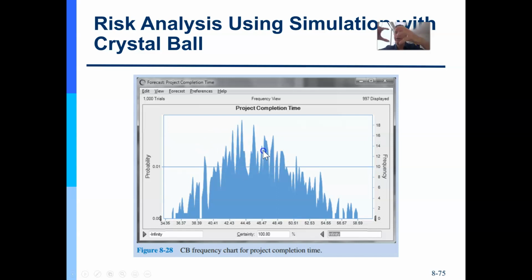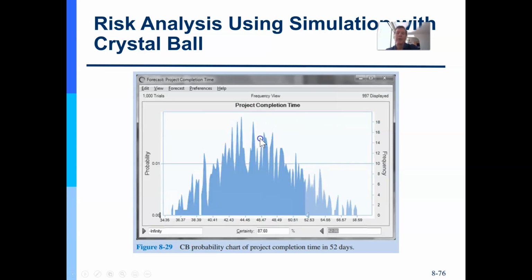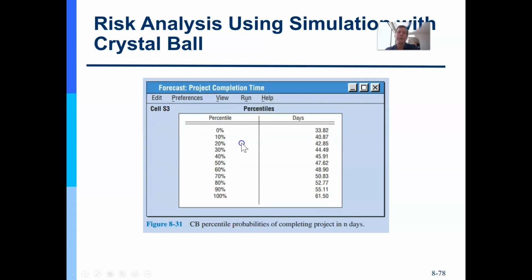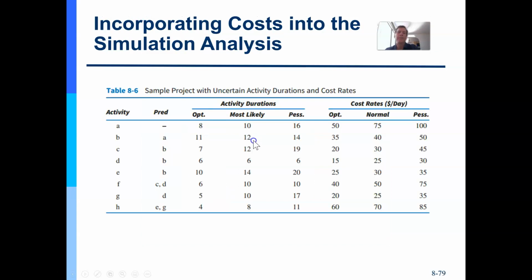You plug in all your variables, your constraints, those activity times, and it will figure out your critical path for you. It will figure out when your project will likely end. You see this is a bell-shaped curve, and the mean is right in the middle. So it's most likely that the project will end around day 46. That gives you something to work from when you're developing your own schedule and comparing estimates of activities from other people around the team.